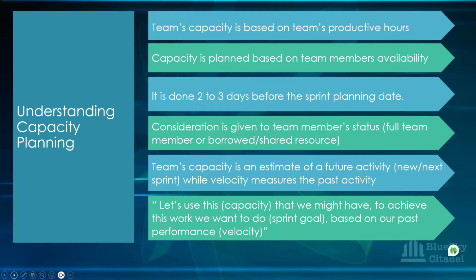Consideration also is given to the team member's status. I talked earlier on, is that team member a full member or a borrowed resource? If you're borrowing a resource, there is always a consensus, an agreement, between your team and the team you're borrowing from. The team you're borrowing from can tell you, oh yes, we can loan him to you, but just for 30% or 40% of his time in a day. So he's not coming to start working with you fully. There will be just a few hours. It might just be in the morning alone, when he comes to do what he needs to do.